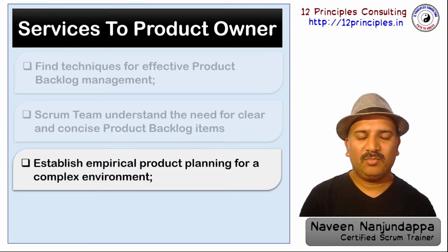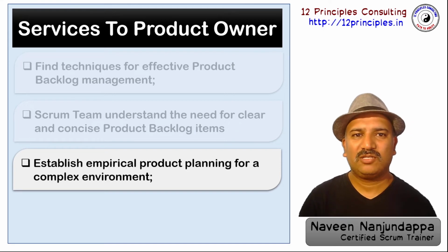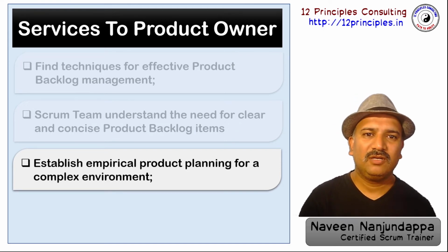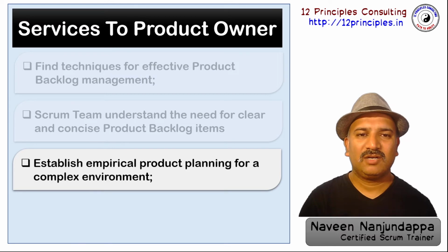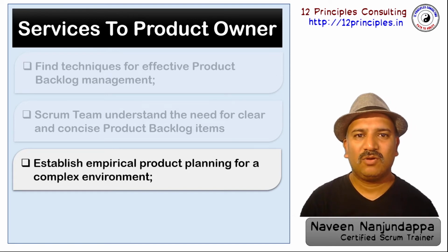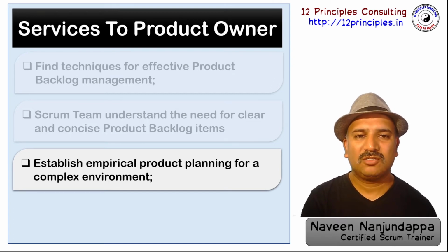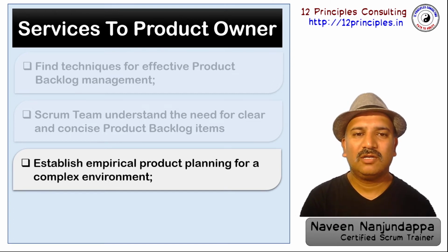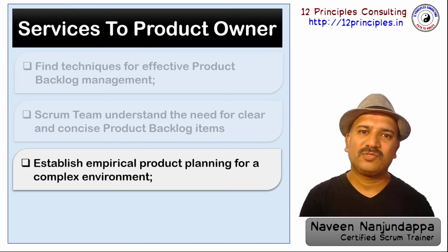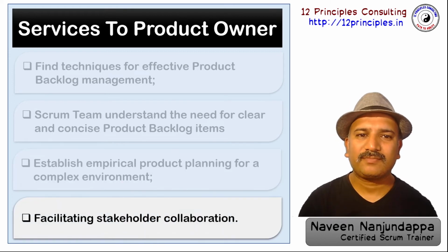Next, the Scrum Master ensures that the product owner understands how to work in a complex ecosystem, especially with the release strategies where the parameters or constraints of the product are mapped. Remember, all 4 parameters cannot be fixed in a complex zone. And educating the product owner and the system is very important on how to inspect and adapt and the purpose of inspection and adaptation in an empirical environment and complex systems.